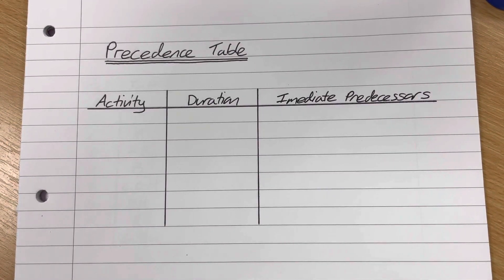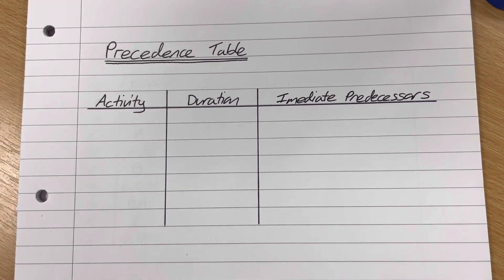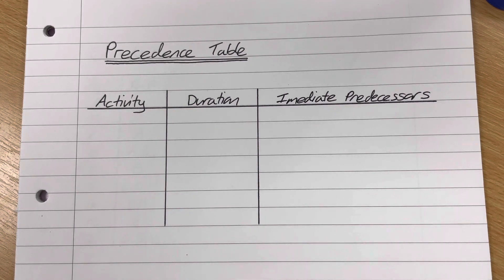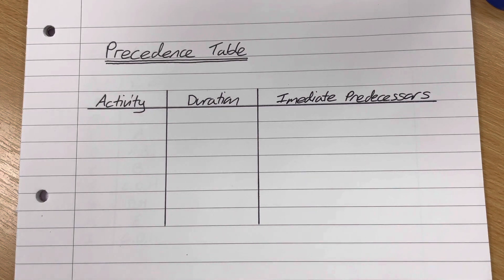Quite often in critical path analysis questions, you will be required to draw an activity-on-arc network from a precedence table. A precedence table is a table which represents all of the activities of the project and tells you what needs to immediately precede it.